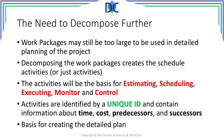The activities are used for estimating, for scheduling, for executing, and monitoring and controlling the project. Each activity has a unique identificator and it contains information about time, cost, predecessors, and eventually successors. They are the basis for creating the detailed plan.